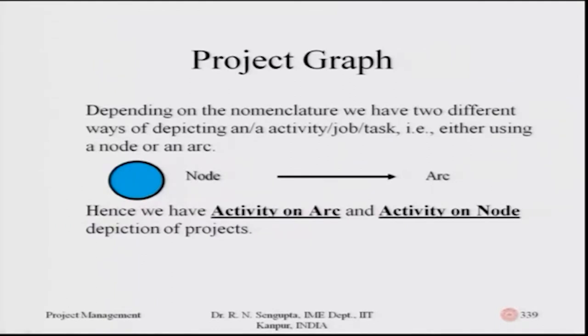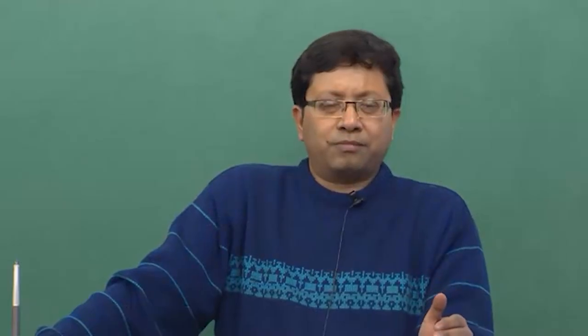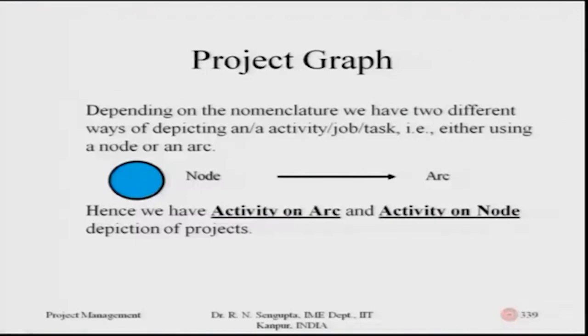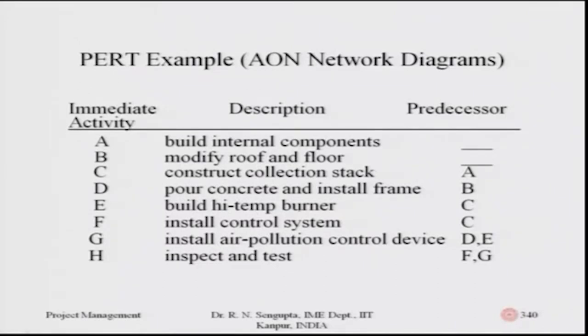Coming back to the project graph — I will revisit a problem we did earlier, but I strongly urge students to go through these slides because they show how variance and expected value are utilized to calculate the probability of finishing work within a certain time frame. Depending on the nomenclature, there are two ways of depicting this: activity on arc (AOA) and activity on node (AON). Here, nodes are shown as blue circles and arcs as black arrows.